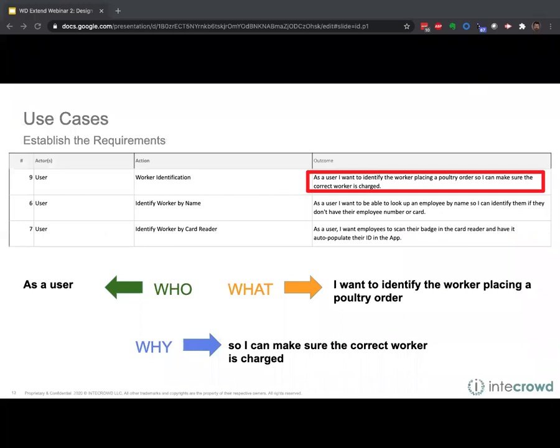Great, thanks, Nicholas. So now that we have all of these artifacts that we've been going through, right? We started with discovery sessions. We came up with wireframes and flow charts of how things should flow. Now we have some idea of the API calls or the endpoints that we're going to need to hit. And then that gives us our overall architecture and the touch points either in or outside of Workday. So now that we have all these things, we can start to develop a list of use cases. This list should, at a high level, serve as an initial list of requirements.